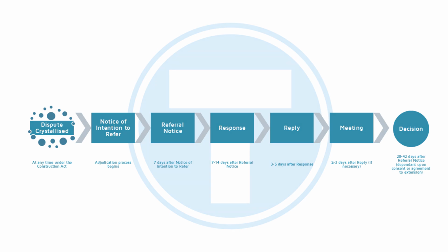The Construction Act gives the adjudicator immunity for their actions, provided they have not acted in bad faith. That means the adjudicator is not liable for anything done or omitted in the discharge of their functions as adjudicator, unless the act or omission is in bad faith. The adjudicator is permitted to correct his decision so as to remove a clerical or typographical error arising by accident or omission. The adjudicator will comply as fully as possible with the rules of natural justice, particularly when determining the adjudication procedure, dealing with the parties and their submissions, and finally in reaching the decision.